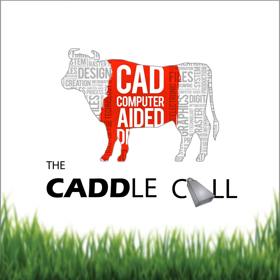When you start to look at the big players in this market, tools like Bluebeam Review, which we talk about all the time, you can easily build tool sets that have the system handling all of your calculations, whatever they may be, in real time as you sketch out lines and add symbols to the underlying PDF. And that eliminates, I think, the need to do a full quantity takeoff in a system, and then transfer the quantities from that to a spreadsheet or a different costing program, and then have to work through 2 or 3 different workflow processes to get your pricing.